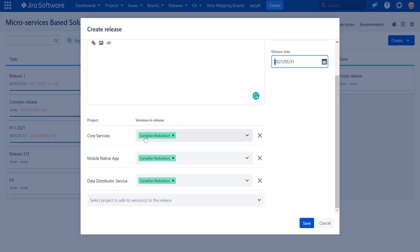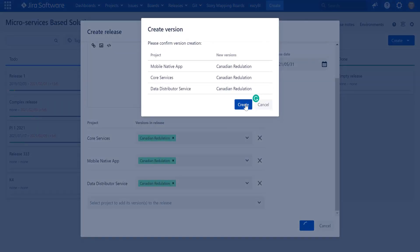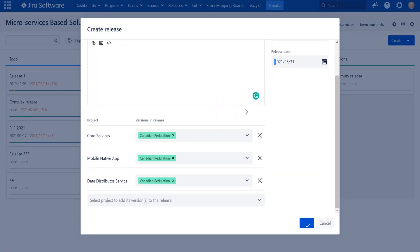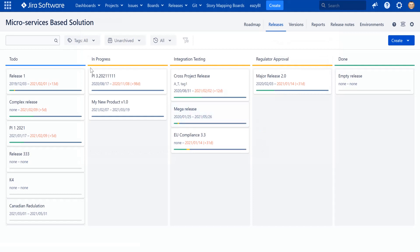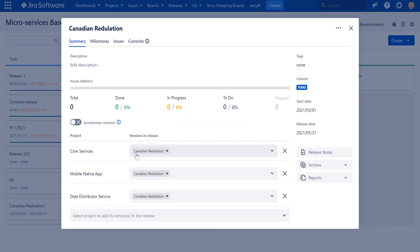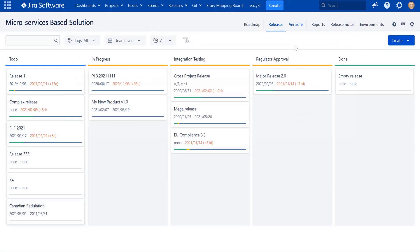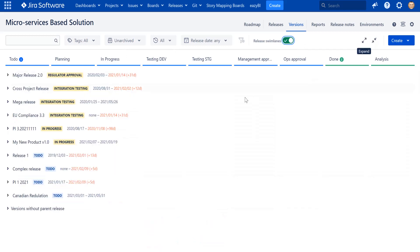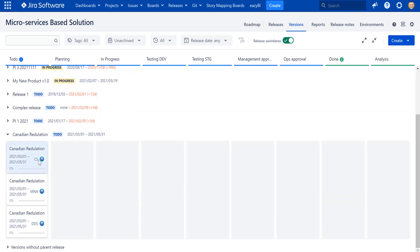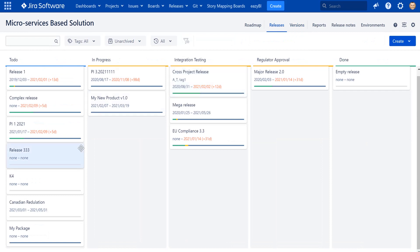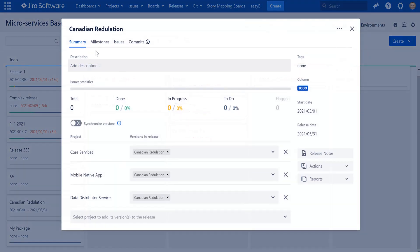Release management offers to create versions with the same name in each project. When I press save and confirm, all versions are created in the corresponding projects and they appear in the application. I can see my release with all labels shown in gray, indicating that all versions have already been created. Moving back to the version board and applying swim lanes, I can see the Canadian Regulation release with all versions created in Core Services, Mobile Native Application, and Data Distributor Service — no need to jump between projects and create them manually.